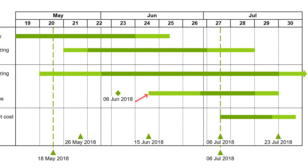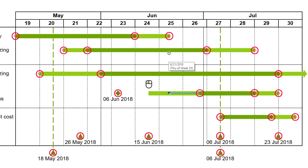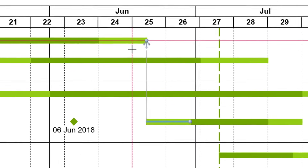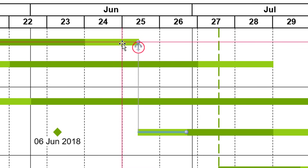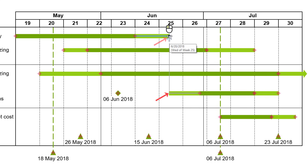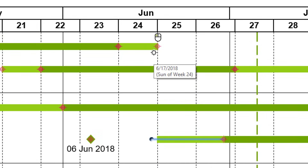What do you do if the beginning of one activity depends on the completion of another? For these cases, ThinkCell gives you the option to anchor bars and other timeline items to each other. Click and drag the handle of the item you want to anchor and place it onto one of the anchor points that appear on other items. Release once you are happy with the anchor position. An anchor icon indicates that two items are connected — meaning, for instance, that if you change the end date of a bar, the start date of another bar anchored to that point will change accordingly. To remove an anchor, just drag the handle away from the anchor point and release.